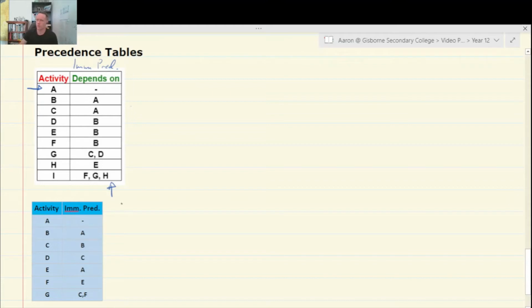So it must be the finish of the project. To finish I, you would then have finished the project. Okay, and then we'll construct the rest of it around that. So to start with, we've got our A edge. And then A is the immediate predecessor for two other activities. So off of A, I'm going to bring off B and also C.